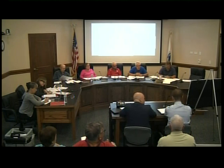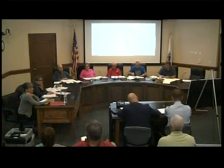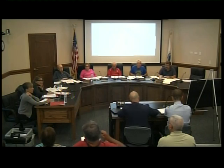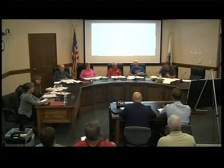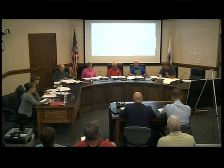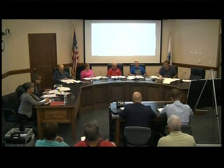And you said that the dump is going to be handled around the same time as the destruction of the house? I mean, the construction sequence is something that's required by the order of conditions. I would assume it would be something they would do before constructing new houses and walls, just from an access issue. Well, we didn't say that so much, I mean, that's a sequence issue, but our concern more is the timing of the vernal pool. If we're cleaning it out, we don't want, obviously, anywhere near the time it's being used, either end of it. Right, so we would probably want that done in the dry, ideally during a summer period or under frozen conditions. Winter would be perfect, yeah.